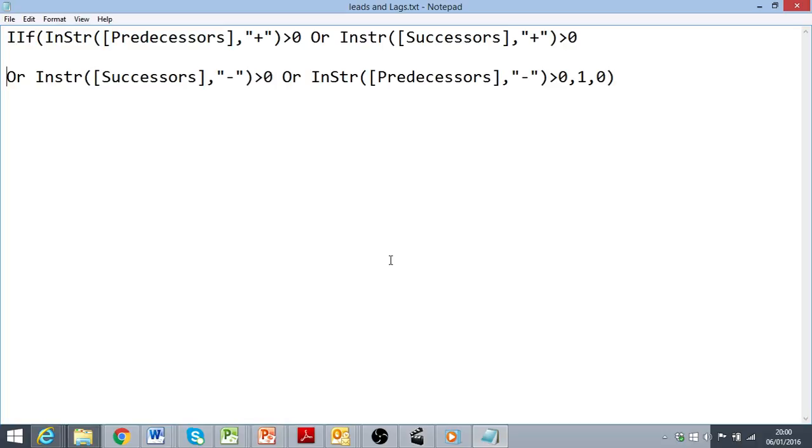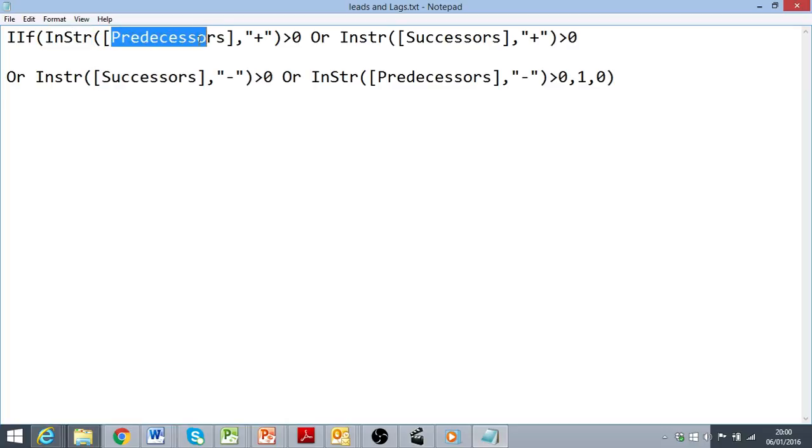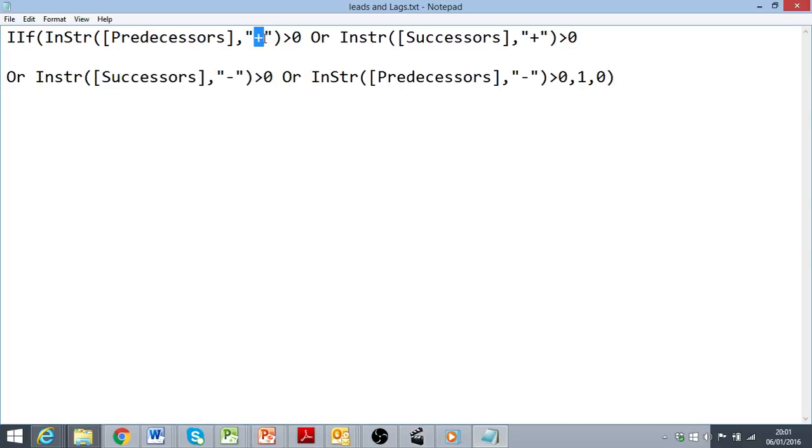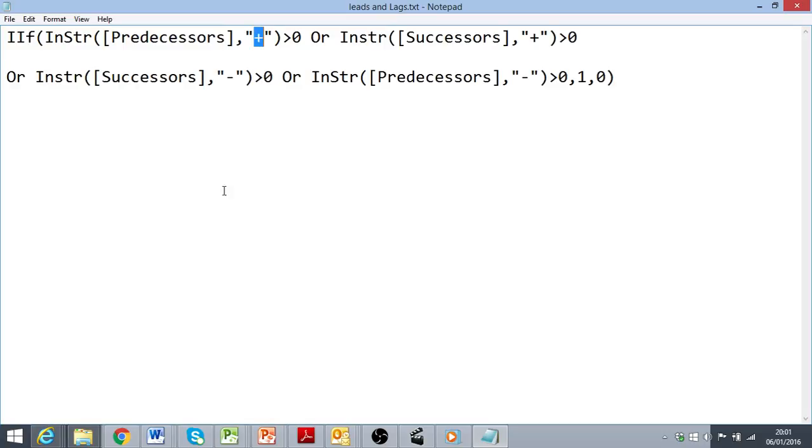And as you can see, I've made use of the if statement, but also a text function called inString. And what that does is look at a specified text string, in this case the field predecessors, and looks for that character within that string. What that function returns is the position in this string that it finds, in this case the plus symbol, and all I'm really interested in is if that is greater than 0. If it doesn't find the plus symbol in the string, it will return a 0, in which case it's not using a positive lead or lag.